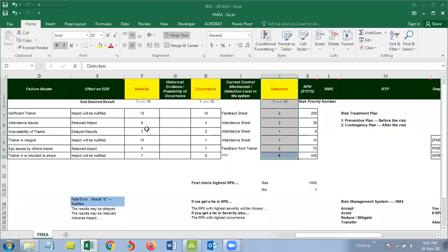So coming to severity, this is rated on a scale of 1 to 10. 1 is being not important, not that critical, absolutely small problem, not a big deal. 10 is really, really bad, like a COVID situation, it's absolutely severe. Yes, it's fatal, it's bad. Somebody getting infected, so severity is probably very high. Headache, I would say less important, not that big deal. So severity 1 means not a big deal, not a big problem. It's okay. 10 is really, really bad.